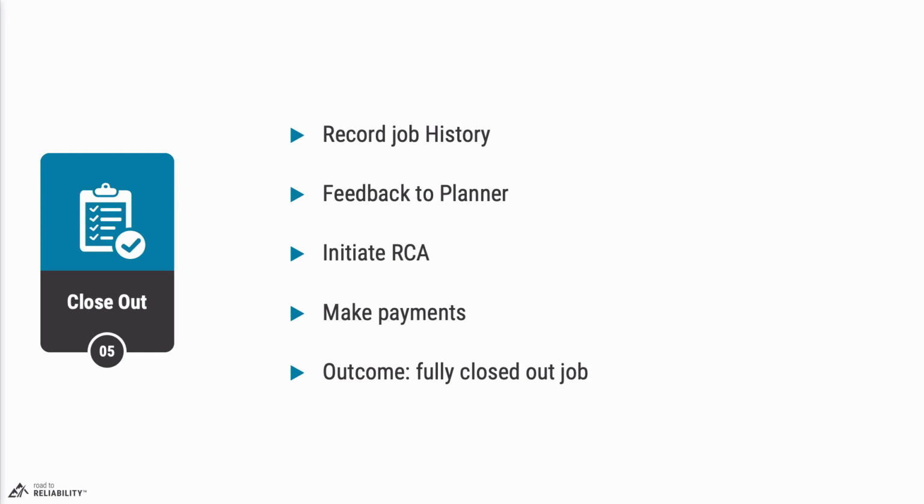And as part of this step, your maintenance supervisor should be reviewing the history that is entered by the technicians into the CMS and make sure that it meets your quality standards for technical history. And at the same time, the supervisor may be flagging certain jobs as requiring a root cause analysis. It could be that the crew has had to do the same repair now several times in a row, or it could be such an expensive repair that we really want to get to the bottom of why did this failure occur.